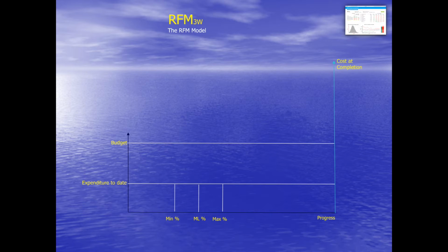Hence, if we illustrate the distribution by means of a so-called frequency distribution curve, we get an equal-sided or bell-shaped frequency distribution curve as shown. The frequency or number of hits start close to 0 at minimum progress, climbs to maximum at the most likely progress, and drops again close to 0 at the maximum progress.